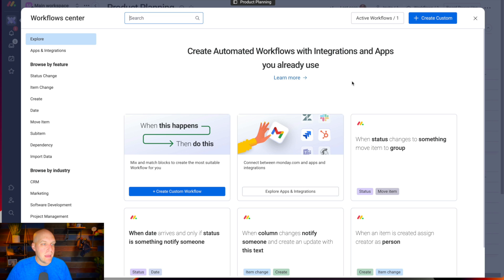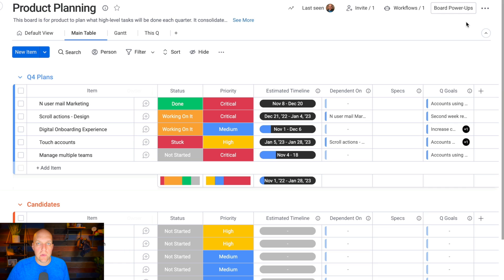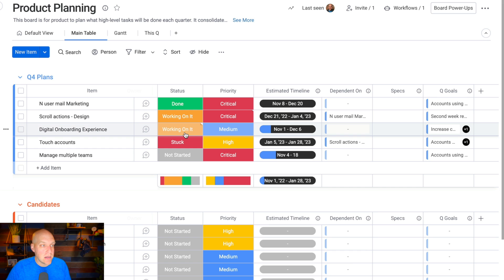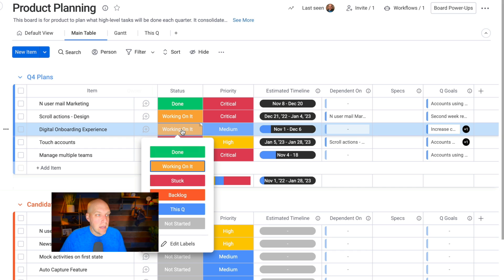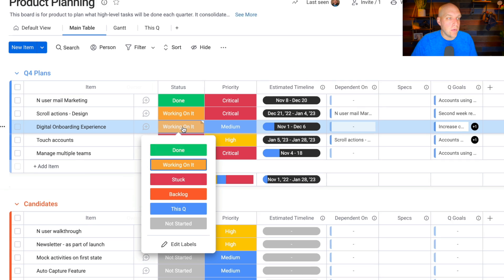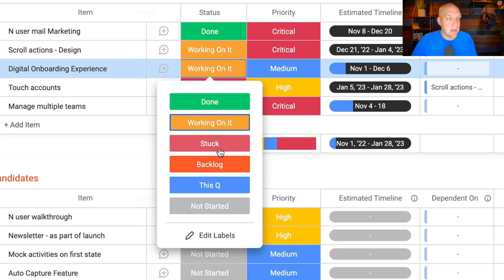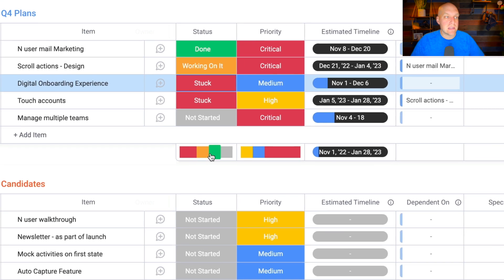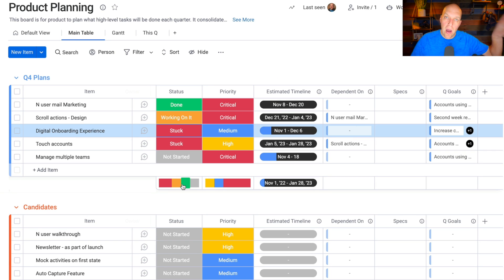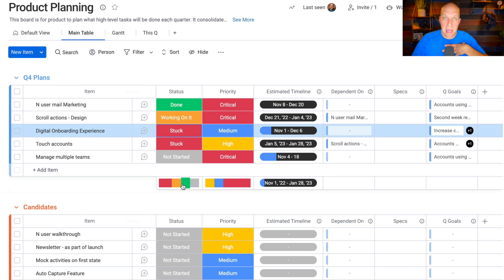Once you have these things, it's super easy to train your staff to say, hey, if you're stuck on a project, just go in here. You're assigned to this project, just click stuck. It's going to automatically fire an email over to me as the admin, and I'm going to know this person needs help.